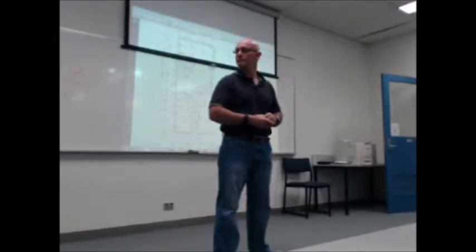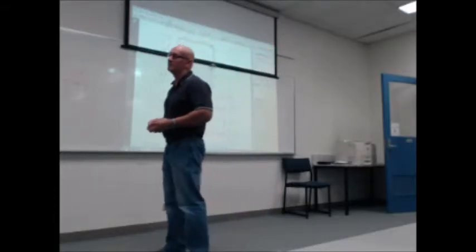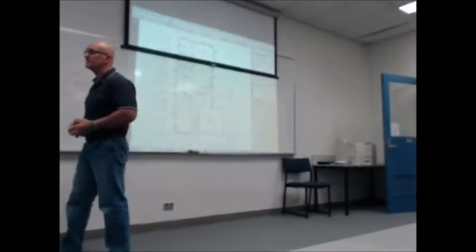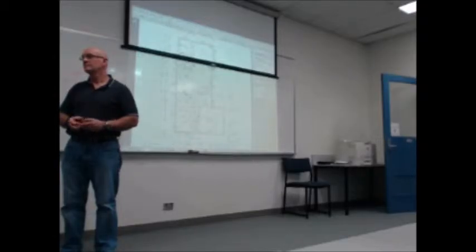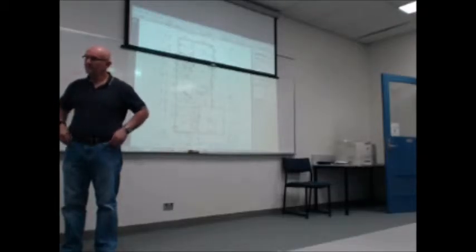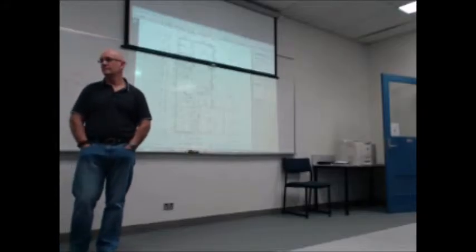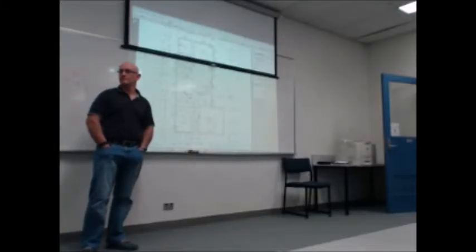I had an architect once with a black door, facing west. I spoke to the architect and said, this is stupid, you know. No, it's going to look brilliant. It's the look I want. Yeah, but what about the client? Spoke to the client. Anyway, long story short, got it in writing that this door was not going to be warranted because it was facing west, it was going to be painted black. Painted it black. Twelve months later, got a call from the client saying, you're absolutely right.